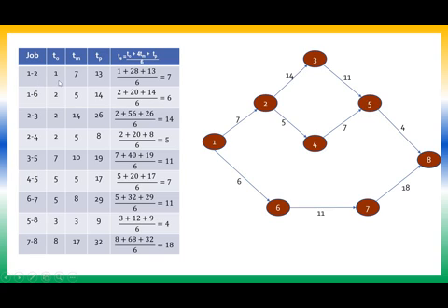So all the given jobs and their time estimates I have written. I have taken 1 plus 7 fours, 28, plus 13. So 13 plus 28 plus 1: 28 plus 1 is 29, 29 plus 10 is 39, 39 plus 9 is 42. So it is 42 by 6, and 42 by 6 is 7, right? So individually for every activity, by using that method, I will find out the expected time.